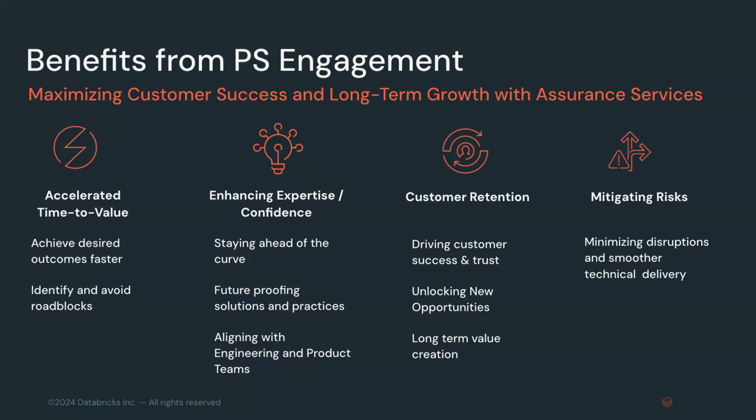So you start thinking: are you getting the same output? Do you know what the tolerances are? You agree tolerances. Do you have the right SMEs to review the data? We try to automate a lot of that too. We have things like DQX or Lakebridge Reconcile, sorry, to help on that journey.